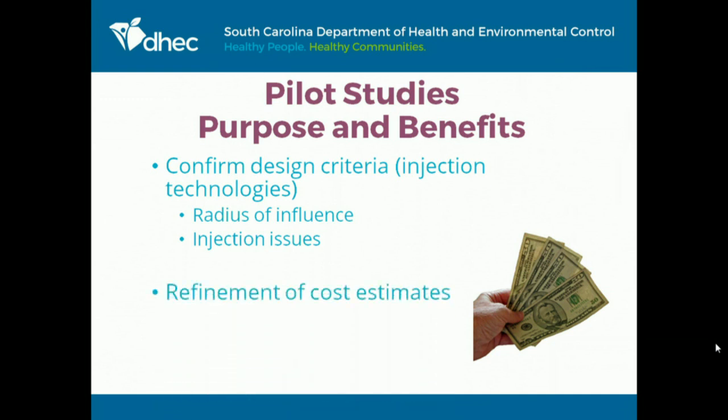All of this is going to help you know how much it's going to cost, which, in theory, we don't really get so caught up in cost, but it's good to know when we're doing a feasibility study and they say, well, this technology is going to cost us $55 million. And we're like, wait a minute, you did a pilot study and your radius of influence is big enough, you're probably only going to spend $10 million on it. So that helps us too.